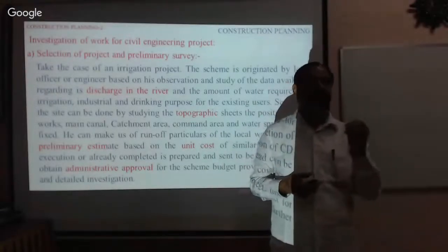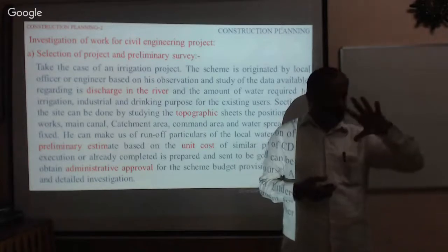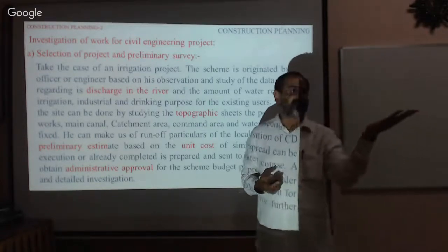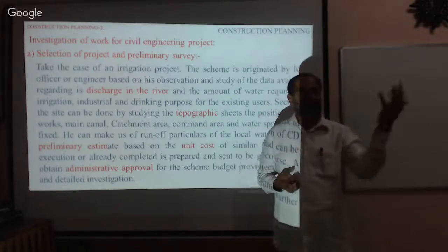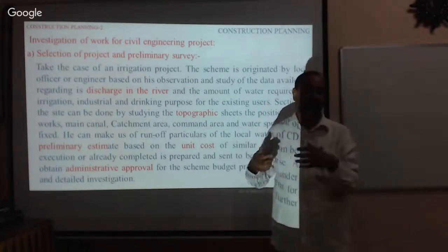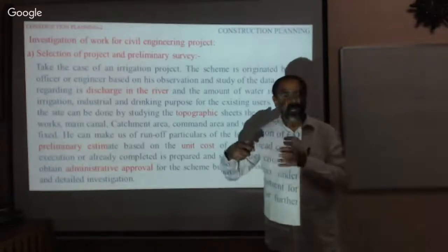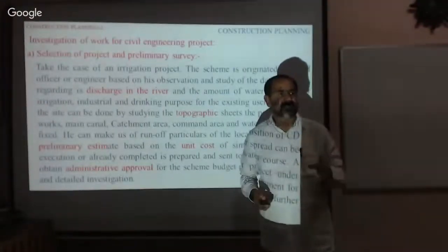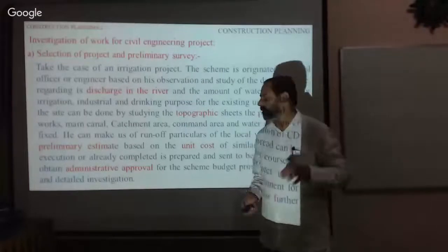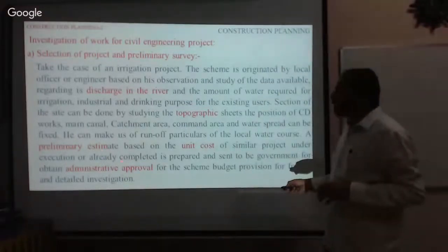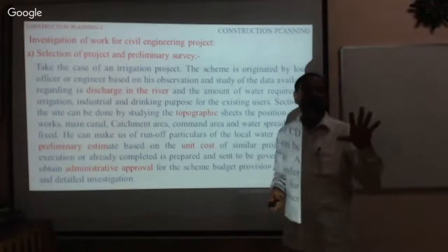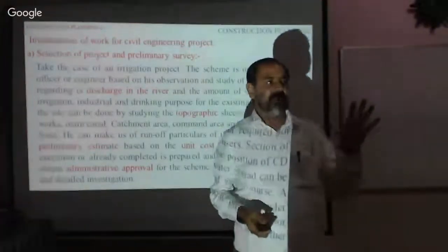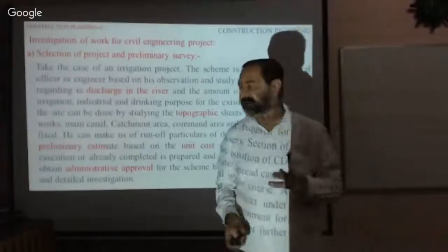It is unit cost. You find it out based on the previous project, isn't it? Earlier the people have done it. You go and collect the data and then process it and tell them that the cost of this project will be like this. It comes to this much, isn't it? The project will commence from that point, isn't it? So therefore, now you please tell me who is responsible to prepare the project. Now the civil engineers are more responsible to prepare the projects, isn't it?